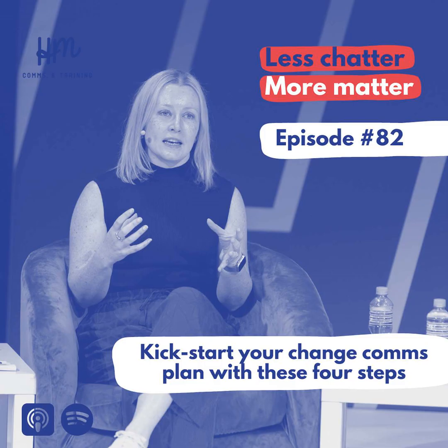Here's how it works. After you've done the scope of change and the brief, you then consolidate all that information into one document called the reverse brief. And this is essentially a playback of everything you've learned, including the outcomes you need to achieve, what's changing, who's impacted, etc., etc. And you send this back to the sponsor and the project lead, and you ask them to review it. Say that once they have reviewed it, then you'll start working on the comms, because otherwise they might not do it. So it becomes a blocker if they don't review it.